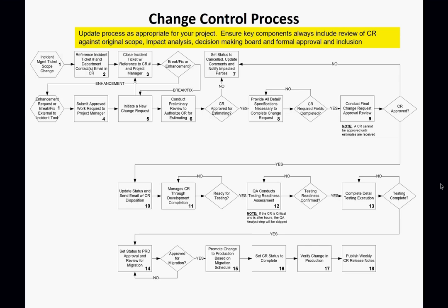Now, the Change Control Board might have the sponsor or whoever the sponsor has delegated to be on the panel, might have a project manager, the program manager, and yourself, the PMO, that is taking the changes to the Change Control Board. Some call it Design Authority, some call it Change Control Board, some would call it Change Control Authority. And sometimes it might just be one person, it might just be the sponsor or the program manager that is doing all of that, that is just approving the changes.